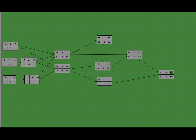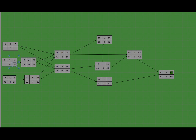Task E feeds task G and task F, so the minimum of the two is 30, and 30 minus 7 gives us 23. For task D, it feeds task G and task F, so we find the minimum of the two, which is 30, and 30 minus 20 gives us 10. For task C, it feeds task E, so the late finish for task C is 23 minus 4, which is 17. Here we have 10. Task B feeds task G and task F.